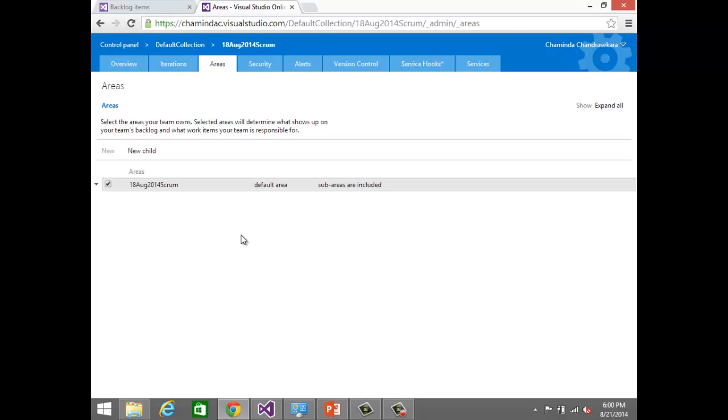Initially in a project there will be only initial development. All will be developing and testing new features, so that will be only one team. But as the project is released to the client and you are progressing with time, there may be requirements to maintain the project or product, plus you have to add new features, and you have to have a support team catering to the bug fixes and hot fixes. In that case you need to differentiate those things. So those are the actual areas. That is the purpose of this particular area.